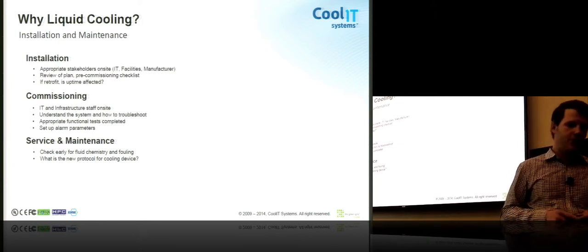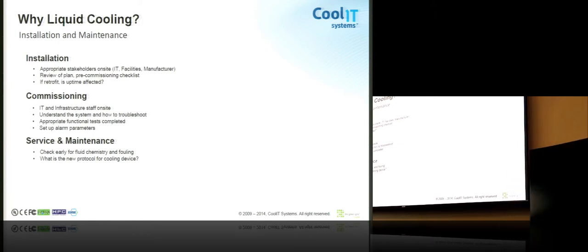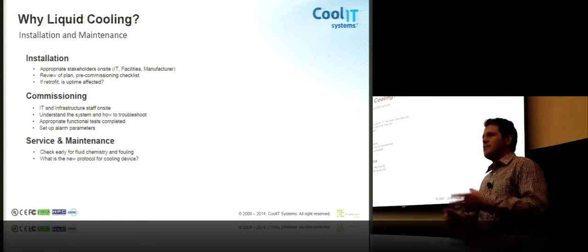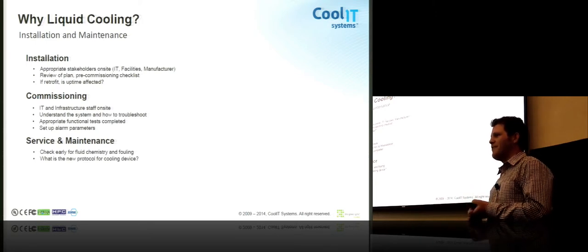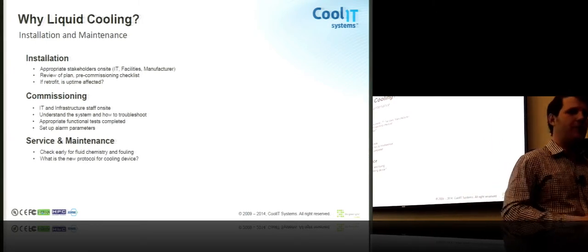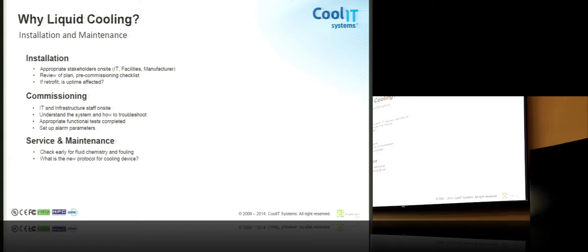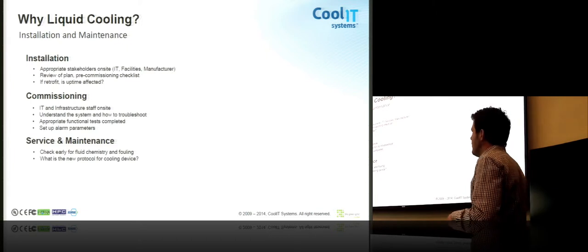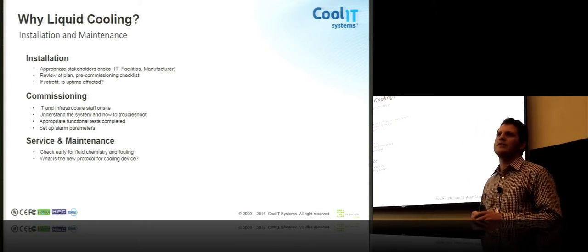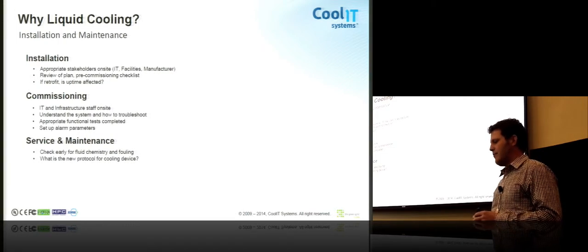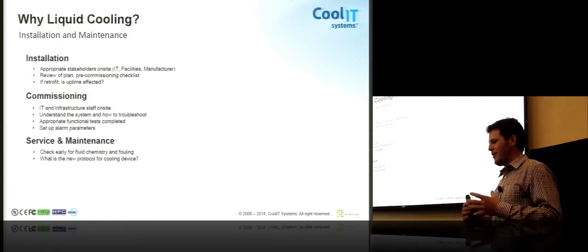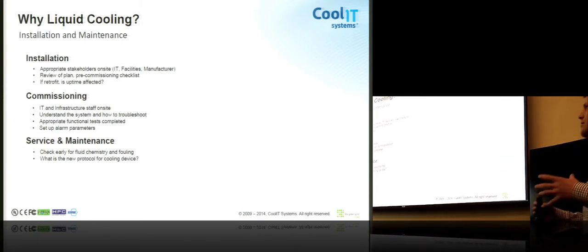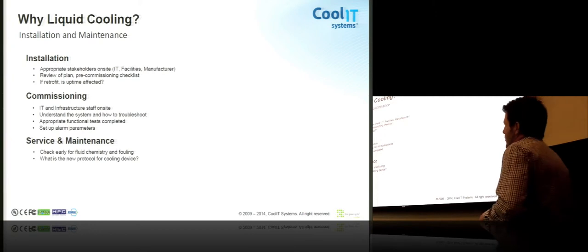So, it may be common to invite your data center infrastructure folks and your IT folks to the party. When you're deploying liquid, because it's new to everybody, you really want to invite the manufacturer, so that the people who have developed the liquid cooling, you want to invite the group who is going to be responsible for the plumbing in the data center. Everybody should come together, of course, for a huddle. There should be a review of a plan and a pre-commissioning checklist that gets figured out weeks in advance. We've run into situations where we get a call in labor where groups haven't done this, and it really does lead to issues during the installation process.